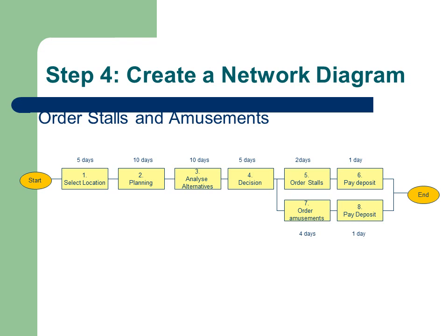This slide shows a very useful tool for sequencing activities, that is, creating dependencies between activities, and is called a network diagram. Schedule development should always be done collaboratively with subject matter experts. A network diagram is a very useful workshop tool to enable you to develop the first cut of your sequence activities before you key it all into your scheduling package. This is particularly important for more complex work packages.